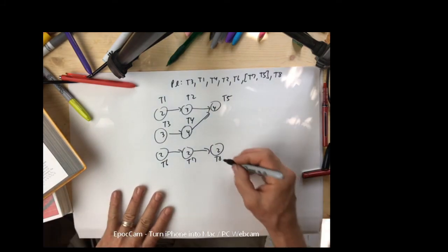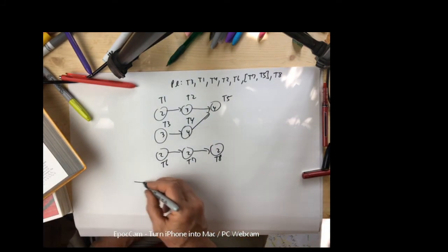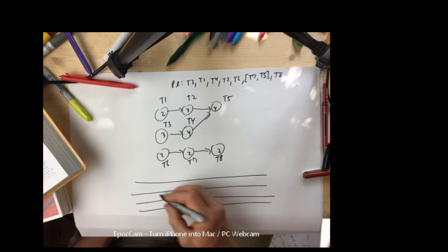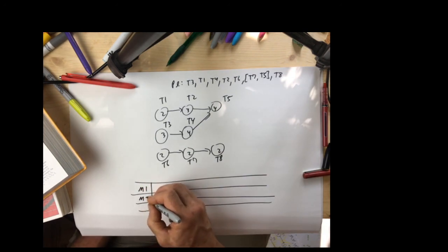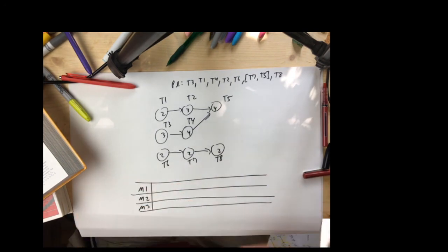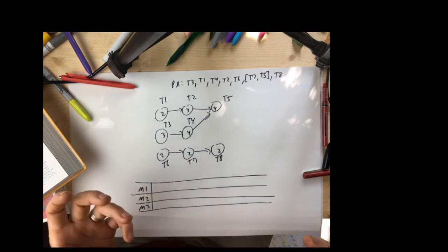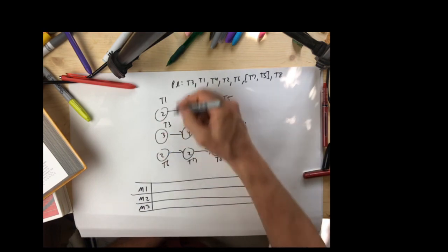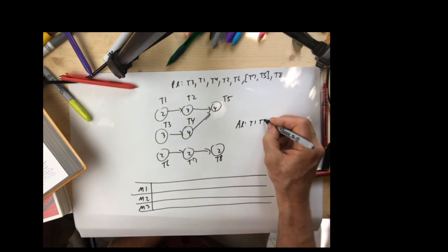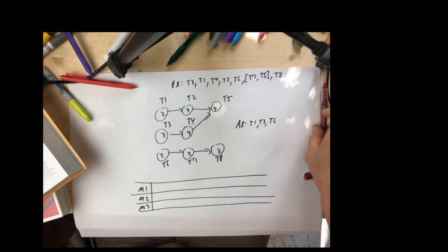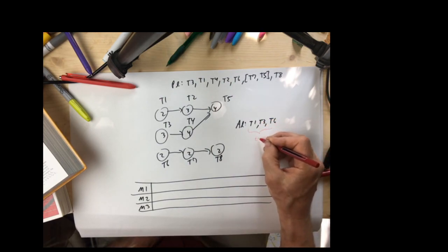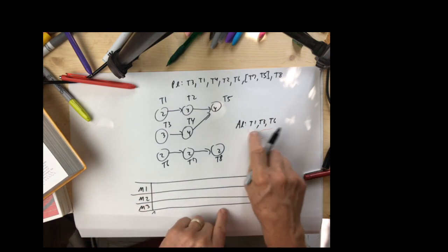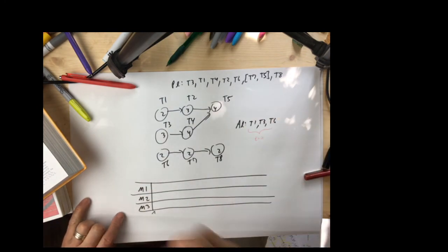And here we go. I'm going to schedule this with 3 people, and you're going to see a frustrating aspect of scheduling when there's too many people there for the jobs. So first off, our available list, again, time equals 0, is T1, T3, T6. Weird thing is, 3 people at time equals 0, 3 jobs available. Don't even look at the priority list, drop them in.